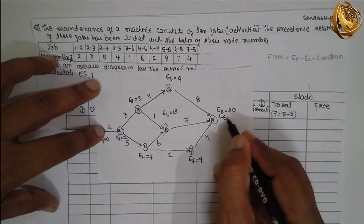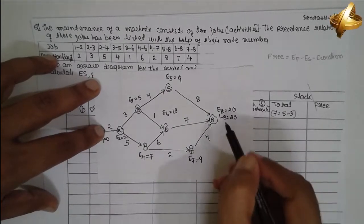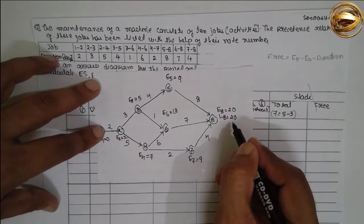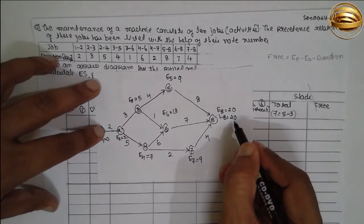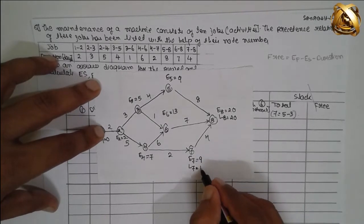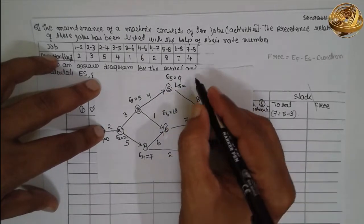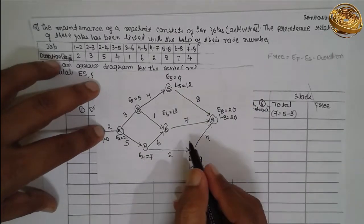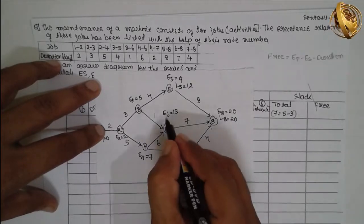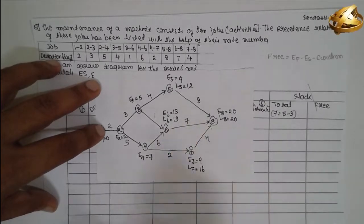Now write L8 equal to 20. Whatever value is obtained, we write in terms of L8. Now we are moving from right to left and must select the smallest value at junctions. Twenty minus 4: L7 equals 16. Twenty minus 8: L5 equals 12. Twenty minus 7: L6 equals 13.